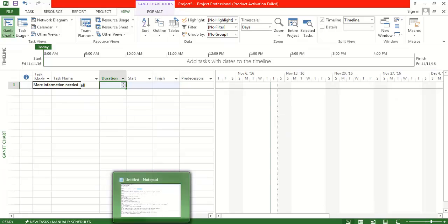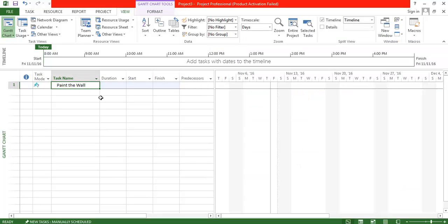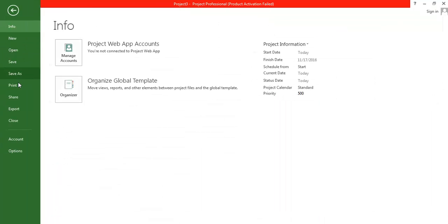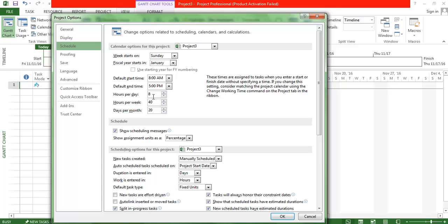The second step is to set a duration of five days for this task. My expectation is to paint the wall in five days. Between those five days, I don't care how many hours a person works. By default, this project expects each person works eight hours per day.